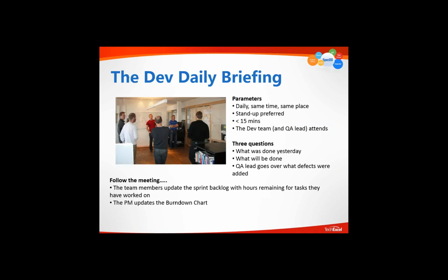If your team is practicing the daily stand-up meetings, what you hope to see is that they are there during the 15 minutes. When they are not there, hopefully you do see the burn-down reports, sometimes even the posted sprint backlog. Nowadays, teams are all using tools, so the backlog, the sprint backlog, or the task board really should exist in a computer as a digital copy.